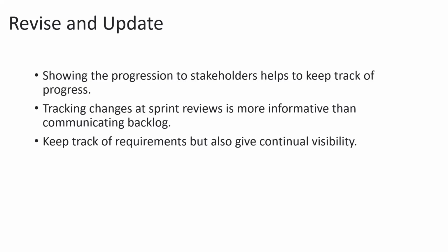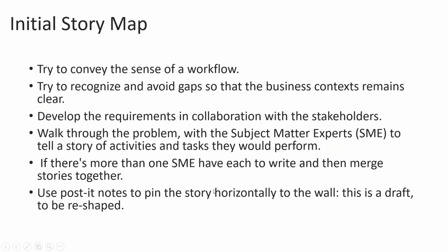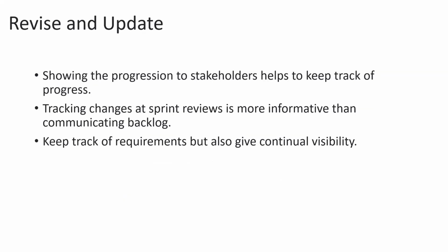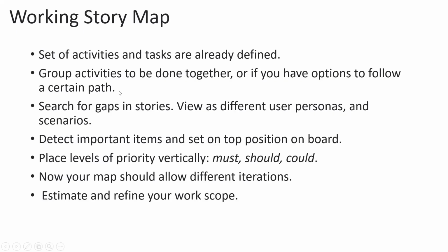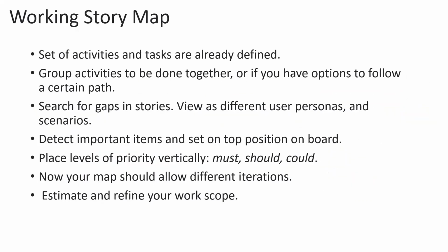So we have to make sure that when your epic and user story mapping is created, whatever tool you are using, whether you have created all the epics and user stories in Jira, or you are managing via an Excel sheet or some other tool, when the entire project along with epics and user stories is already created, we keep revisiting the story map or the project to make sure that whatever changes we have to make, we continuously revise and update whenever required, right? It is also advisable that once your working story map is ready, we do a quick review with our stakeholders and client representative also, to make sure if there is anything that has to be considered, right?